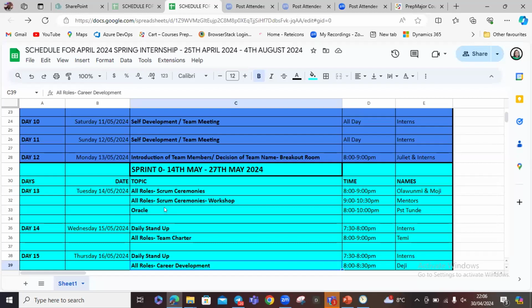So we do it from Tuesday. Tuesday starts your week, right? Your sprint starts on Tuesday and ends on 2 Mondays from then. And the Monday is when we do our review. That's our demo session, showcase. They all mean the same thing, where you give feedback to the stakeholders on what you've done for the 2 weeks. So we'll start you with Sprint 0, middle of next month, and then take you gradually for 2 weeks.